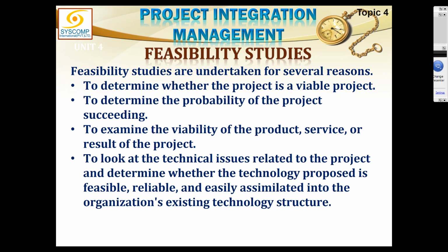If you ask me, I would divide the feasibility of a project into three parts: strategic feasibility, technical feasibility, and financial feasibility, in the same order of priority. The biggest priority goes to strategic feasibility, because strategic decisions overrule any technical or financial consideration.